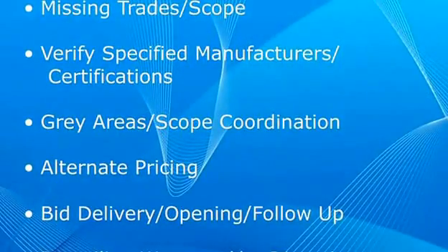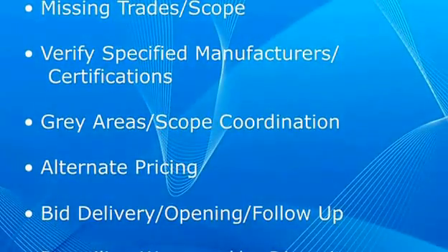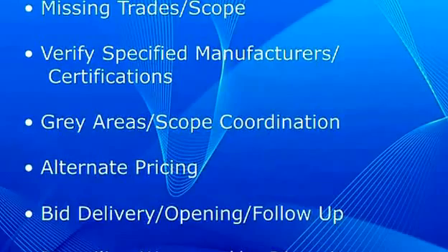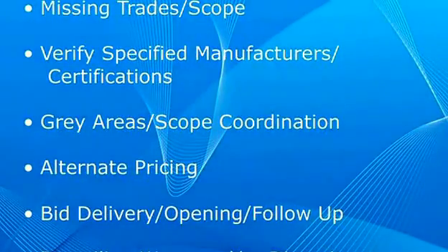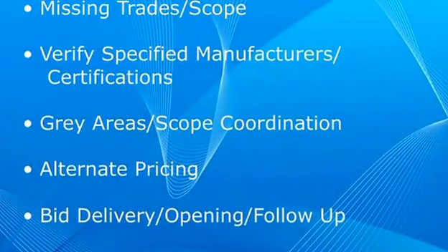Okay, I'm going to wrap up real quick. Bid day. Bid day, it's very hectic. You need to have somebody there. Typically as a general, we have somebody at the site where you have to turn in the packages. You have to give them enough time to hand write down 2 copies, possibly 3 copies with all the alternates. You have to give them time to get those numbers in, because 1 minute after the bid, the box closes and you're done. If it's not in there, it doesn't matter if you were low or not.